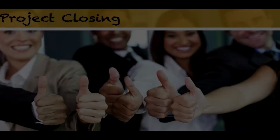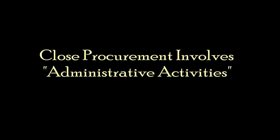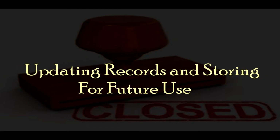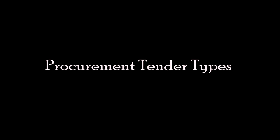Close procurement. Close procurement is the process of completing each procurement. The close procurement process involves administrative activities such as finalizing open claims, updating records to reflect final results, and archiving such information for future use.